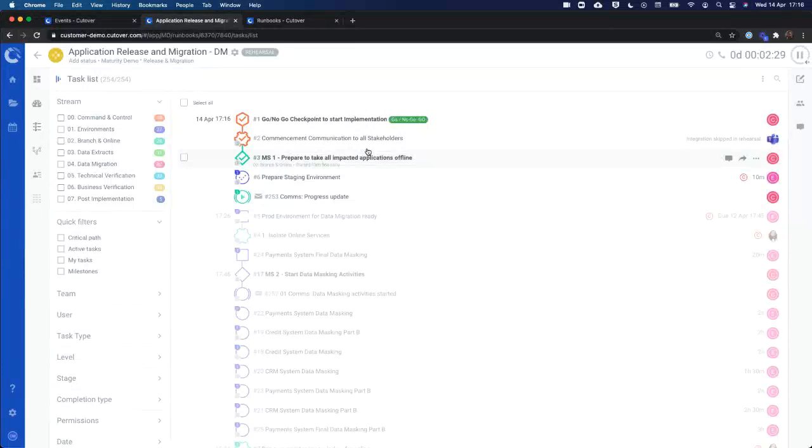Now, you'll notice a couple of things when I do complete the task. It will give you the actuals here on the right-hand side in terms of how long it actually took me to execute that task. But not only that, it will unlock the next task, and also reforecast the start time for those next tasks based on the dependency tree that you've identified. It will reforecast the start times to the current time. So rather than waiting 10 minutes to execute the next task, it will reforecast it to start as early as possible. So if you end up completing this task ahead of 10 minutes time, then you can start it as early as possible.